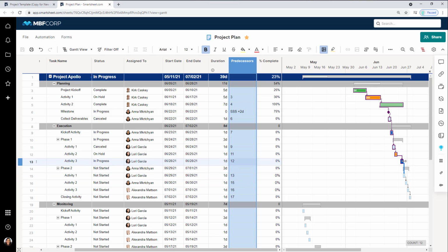Lastly, we've taken a look at several different paths, and these paths are just the same idea. We're highlighting critical tasks to accomplishing a specific task, and we're just approaching this at different levels. So, for example, our critical path is going to highlight all of the tasks that will impact our entire project getting completed. Our summary path will highlight the tasks that will impact our phase getting completed, and our driving path will highlight the tasks that will impact any task getting completed. You just have to click on a specific task to enable that.